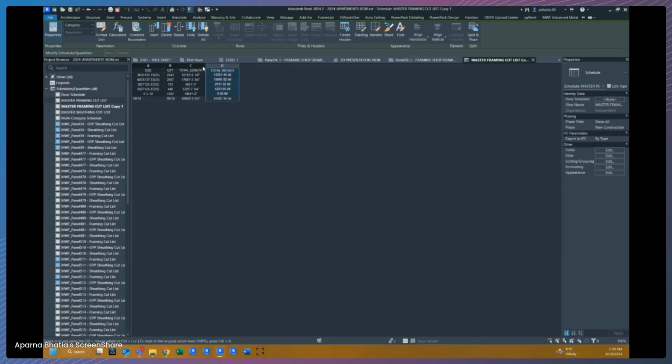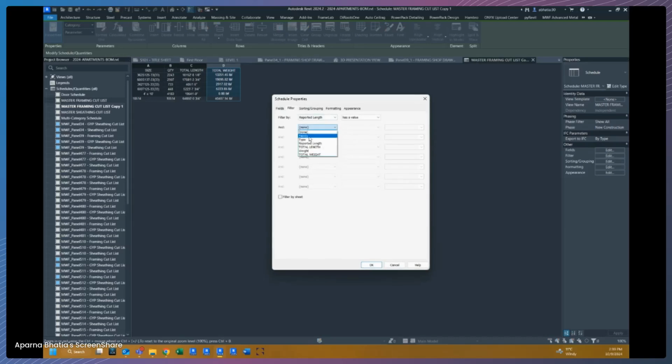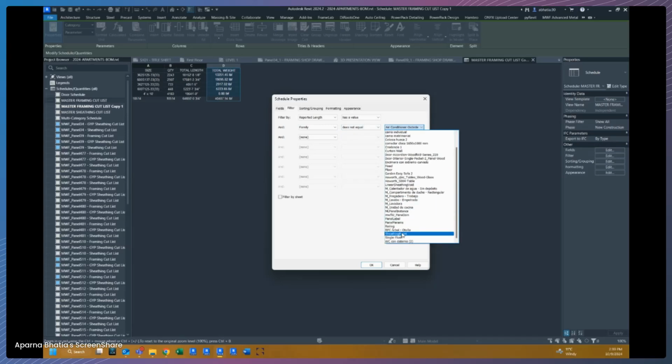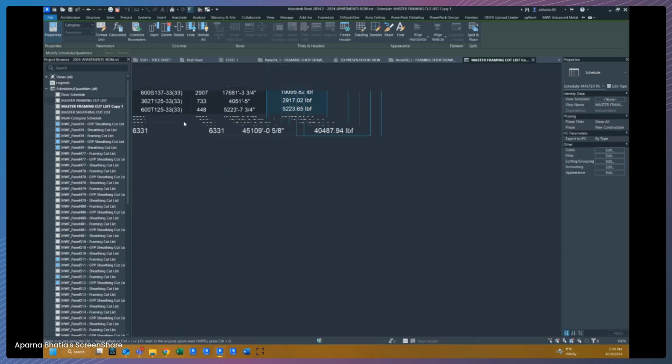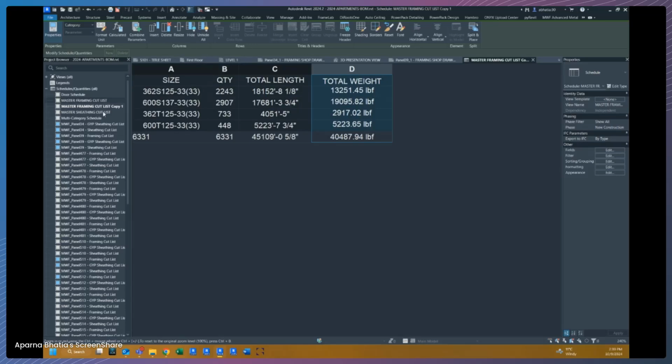So if you just need a quick count, and maybe you can just quickly frame the entire building and get a quick count of how much steel you may need, you can add that value in here. And if you want to ignore or remove the sheathing values and fun things like that, feel free to do that by just adding it to the filter for the family type. Does not equal sheathing panel. And that's it. It'll get rid of that as well. All right. And this will give you a nice little overview of what you're using in your project.